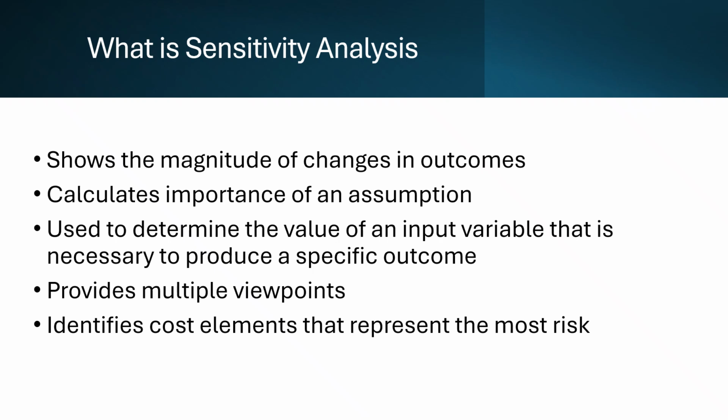Sensitivity analysis involves recalculating the cost estimate with different quantitative values for selected input values or parameters in order to compare the results with the original estimate. Sensitivity analysis is used in capital budgeting to evaluate how sensitive a project's outcomes are to changes in key input variables. How will the net present value and internal rate of return change if the sales volume increases or decreases, or if the selling price increases? Next, we will look at the qualitative steps of sensitivity analysis.